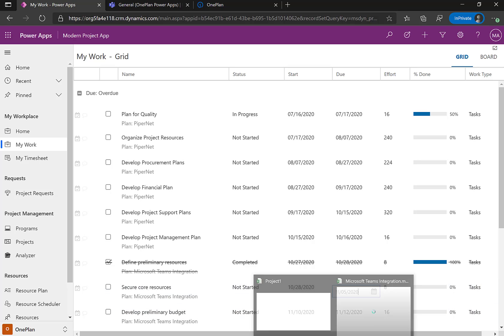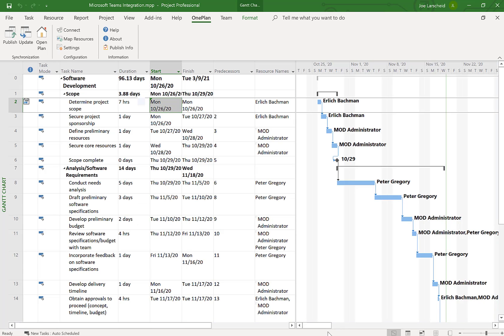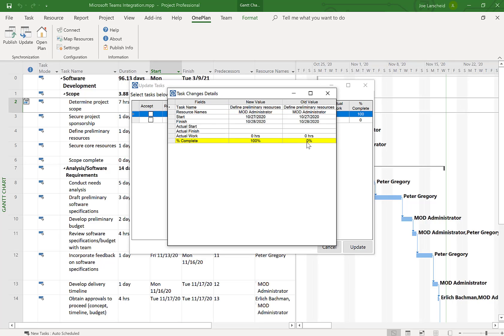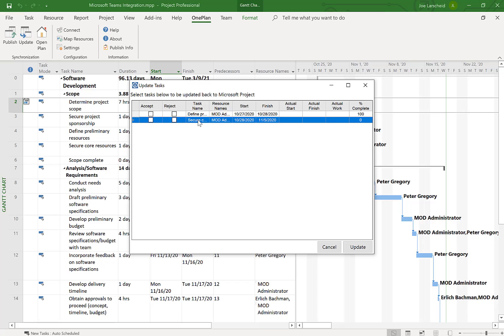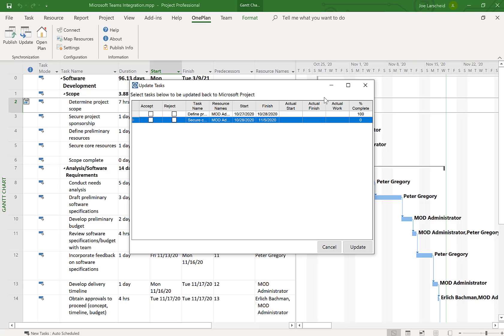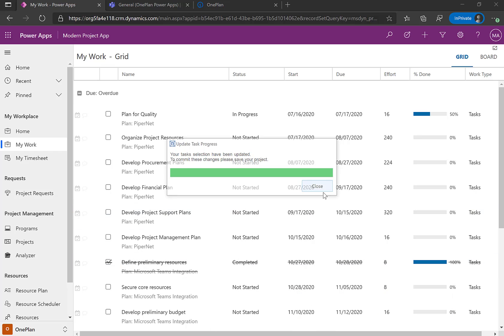So as a project manager, I will get notified of these updates. I can come back into my Microsoft project schedule and I can click on updates. And you'll see here now I have two updates being reported back to the project manager within Microsoft project desktop. I can click on each one of these updates to see what has been changed. So I said that the define preliminary resources went from zero to a hundred. Okay. That sounds good. I can click on here. The next one and see that this date has been changed from the 29th to the fifth as reasonable. So now I can accept these changes.